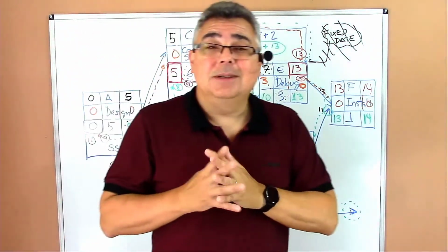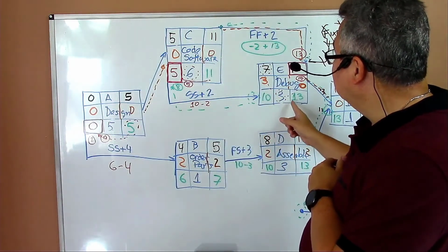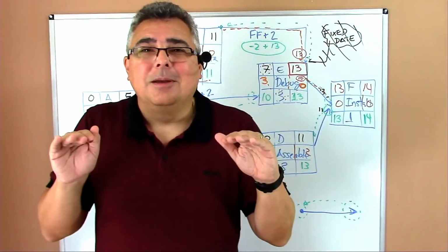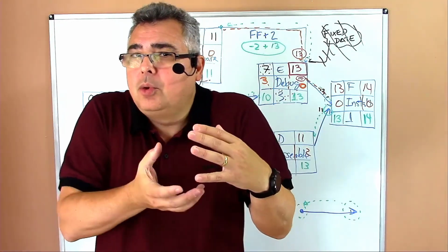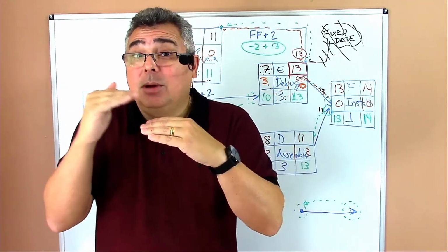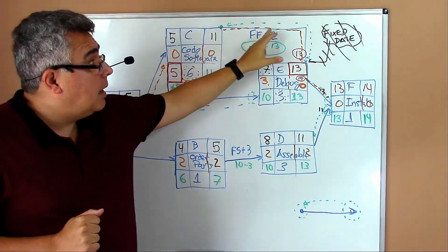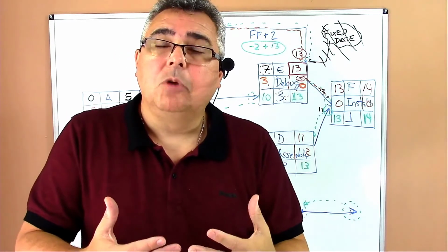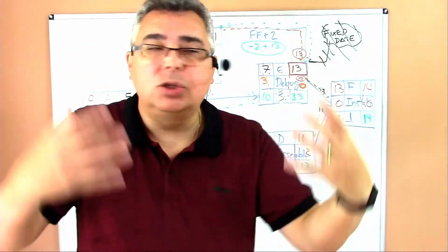But then the project manager thought, okay, but if the guys here start going too fast, they will be finishing by day 10, before the code. But they cannot finish the debug before the code is completed. So he could anticipate, so people start working together to gain some time. But he said, I cannot allow that task to finish before the coding is completed. Therefore, he put as well a finish-to-finish relationship with a lag. So the debug team can start working earlier, but they cannot finish before the code is complete. And that was the reasoning of doing that.